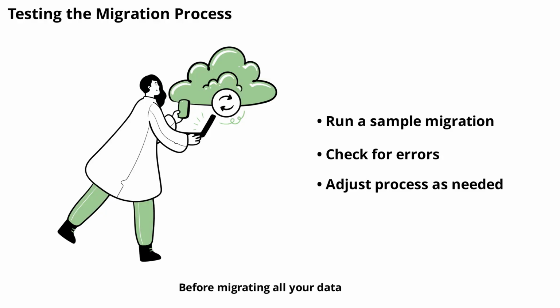Before migrating all your data, perform a test migration with a small sample. This allows you to identify and resolve any issues without risking your entire database. Check that data is transferred correctly, fields are mapped properly, and no information is lost or corrupted. Testing helps you fine-tune the process and ensures a smoother, full migration later on.